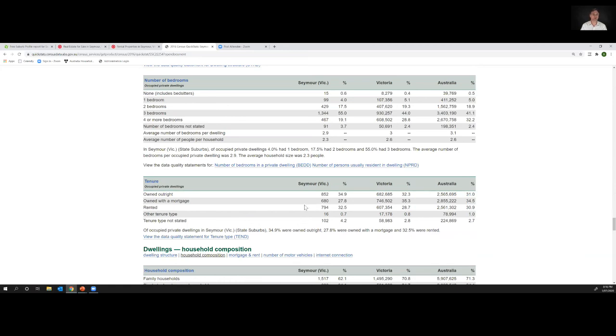Now, if you've got a tight rental market and you're looking to do a renovation for rent, that will serve you for increasing your rent. If you had an abundance of rental properties and you're looking to do a significant cosmetic reno to increase your rent, you might over-capitalize because the supply might be so great that people may not pay that much extra for your rented property. So the timing in the market needs to work.